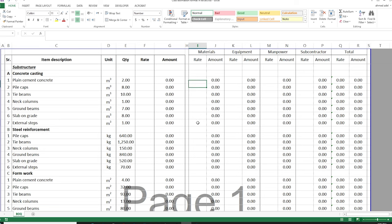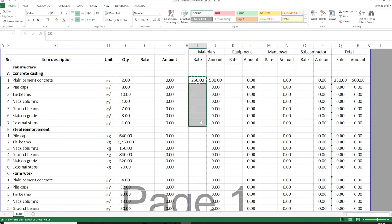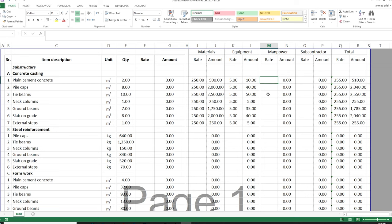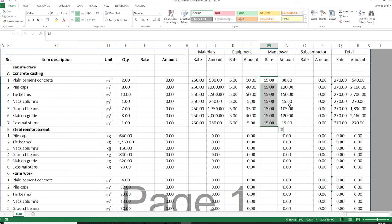When we are talking about concrete casting, I have only the materials of the concrete plus pump plus temperature control. So I'll put 250 here for materials, and for equipment maybe a vibrator, so I'll add 5 dirhams per cubic meter. For manpower — I have shown in a previous video how to calculate manpower cost for each activity; I'll leave the link in the description — I'll put 15 here. You can link these cells to your other sheets. For subcontractor, I don't have anything.